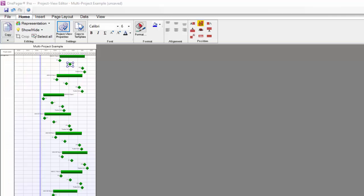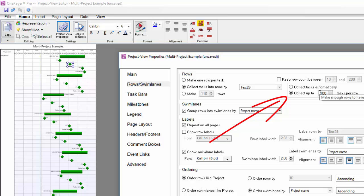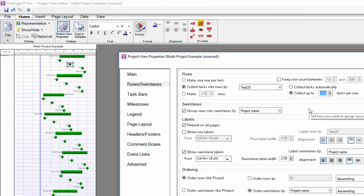Back in my PVP form, I need to make sure to choose the value for collect up to N tasks per row and dial that value up. This will allow OnePager to put the milestone shapes on top of the Gantt bar.